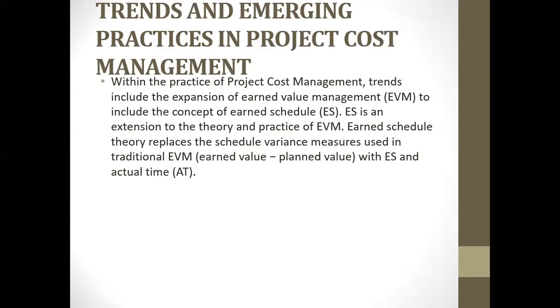So within the practice of project cost management, trends include the expansion of earned value management to include the concept of earned schedule. Earned schedule is an extension to the theory and practice of earned value management. Earned schedule theory replaces the schedule variance measures used in traditional EVM, which is earned value minus planned value, with ES and actual time.